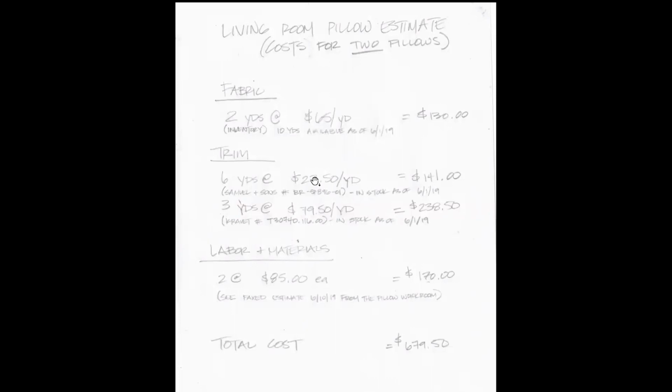So when the designer is selecting the material and verifying the price and verifying the stock, the designer may also order what we call a CFA, which is a cutting for approval. And that's when the manufacturer of the product will take a little snip of what they have in their warehouse, and they'll send it to the designer, and then the designer will make sure that the color is good and that the feel is good and that this is in fact the product that they want to use.